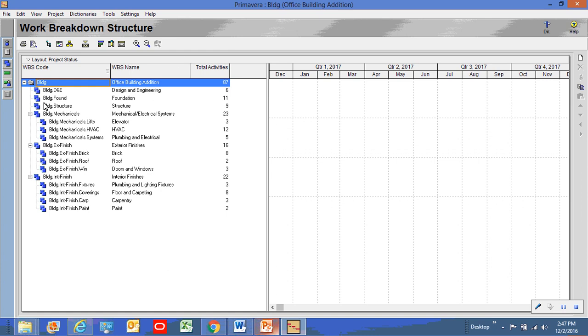So when we're building a schedule in a program like this, because I can only work on one schedule at a time, it's not really convenient for me to copy activities from one project over to the other one, which is a big time saver that we use in the other programs, where I just bring up both schedules on the screen, I highlight some of them that are in the one project, and I can very quickly copy over those activities to the other project. But again, we don't have that sort of opportunity here. Now, if you wanted to take the whole project and copy it, yes, I guess you could start from there and just strip out the activities that you don't want to see.